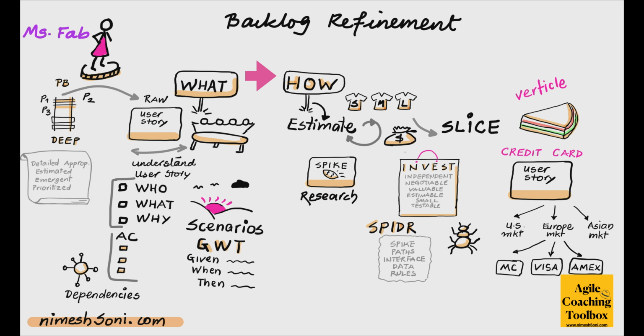So when do we stop this iterative cycle for this particular story? Right? One is that we have reached a point where we have identified the stories which are coming out with small or medium estimate. And second, the story meets the definition of ready. This is the definition that the team would have come up with earlier.